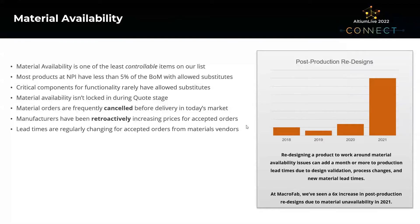In a few cases, a purchase order is placed, everyone accepts it, we're waiting for delivery, and now the price is changing. As a contract manufacturer, we can't just authorize new prices for materials — we have to go back to the customer for approval. Historically, material issues impacting products already in production were very rare. But in 2021, at Macrofab we've seen a 6x increase in post-production redesigns due to material unavailability, where a core material for a product suddenly became unobtainable.